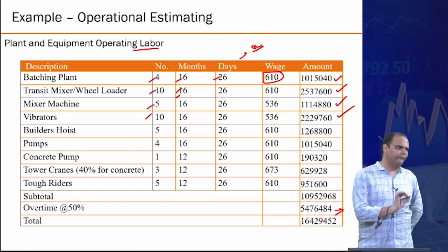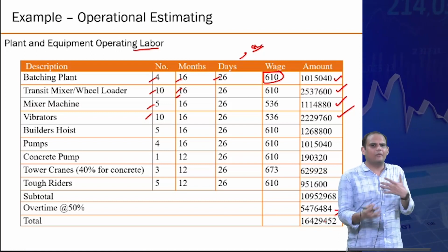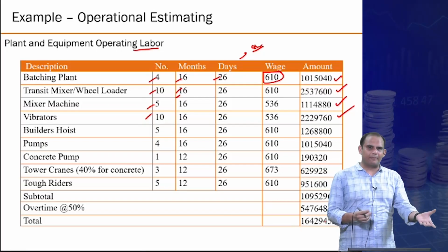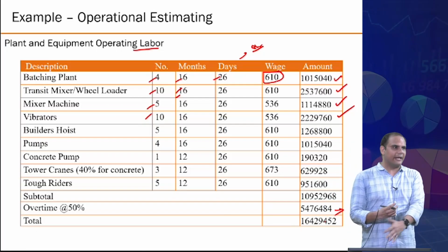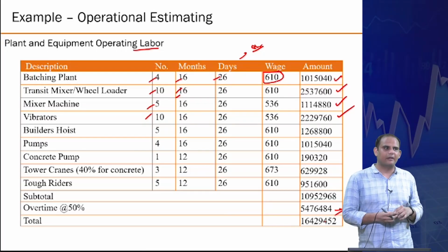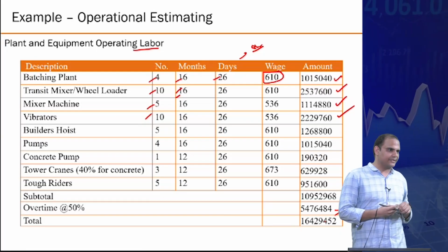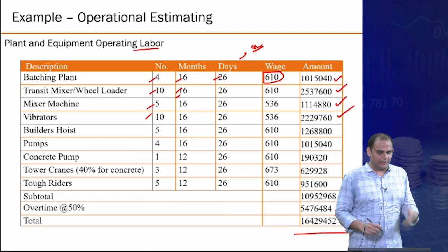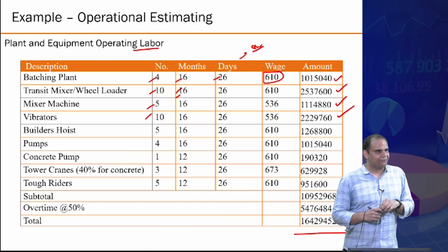There's a lot of overestimation involved in these things, because there's a lot of uncertainty around it. It's not that you are unnecessarily giving 50% extra. It's just that, because there's so much uncertainty, you actually end up spending much more. So you typically estimate on a conservative side rather than a too optimistic side. So you get the labor that you will spend only for operating the machinery. Got it?